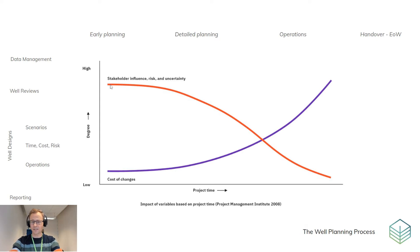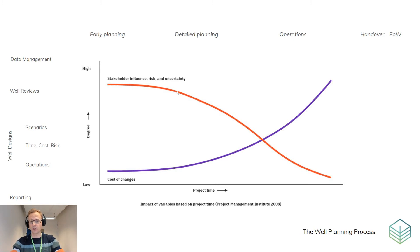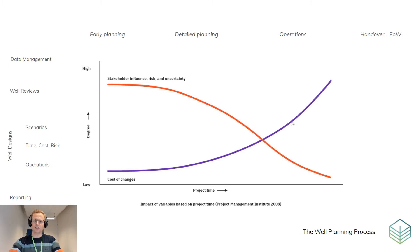If you sanction a well at this level, you carry great uncertainty of what is going to be done. Following the red line to the right, you are making more decisions and the uncertainty is being reduced. As you can see, the cost of change is increasing. You have already locked in some major decisions and going back on these will come at a penalty.